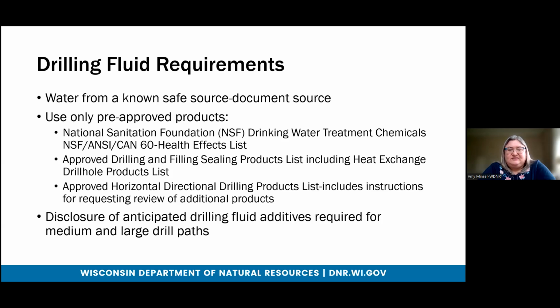And we are asking all projects with medium and large drill paths to disclose what drilling fluid additives they plan on using. There is a possibility of submitting an amendment should that information change.